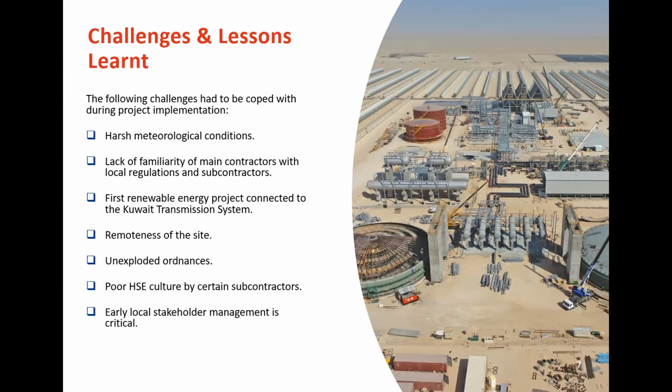On the other side, the remoteness of the site represented a risk in itself, an HSE risk, because typically a lot of vehicles had to travel to the site from Kuwait on a daily basis. At a certain point, the number of laborers working on site was significant, and this represented a risk for motor vehicle accidents. So in this case, a number of actions and a contingency or mitigation plan was put in place.